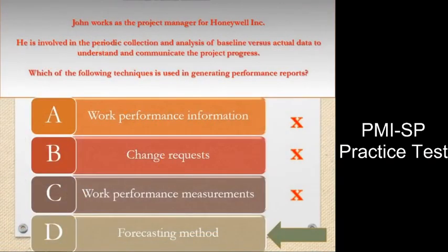Answered option B is incorrect. Change requests are requests to expand or reduce the project scope, modify policies, processes, plans, or procedures, modify costs or budgets, or revise schedules. These requests for a change can be direct or indirect, externally or internally initiated, and legally or contractually imposed or optional. A project manager needs to ensure that only formally documented requested changes are processed and only approved change requests are implemented. It is an output of the report performance process.